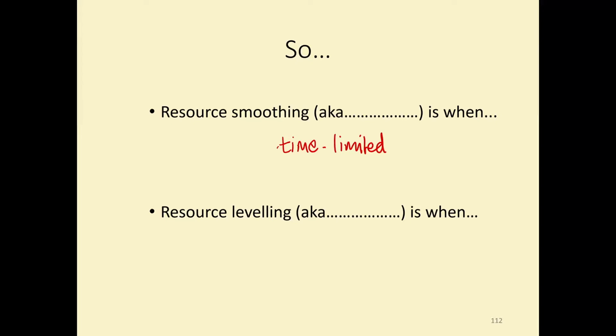Right. Can you remember I said to you, once we assigned 2 resources to each of the activities, so we did the network diagram, we did the Gantt chart, and then we said, let's just assume that each of the activities needs 2 resources, and we put the number 2 above each of the bars, and we use that to create the resource histogram, which gives us a picture of the loading.